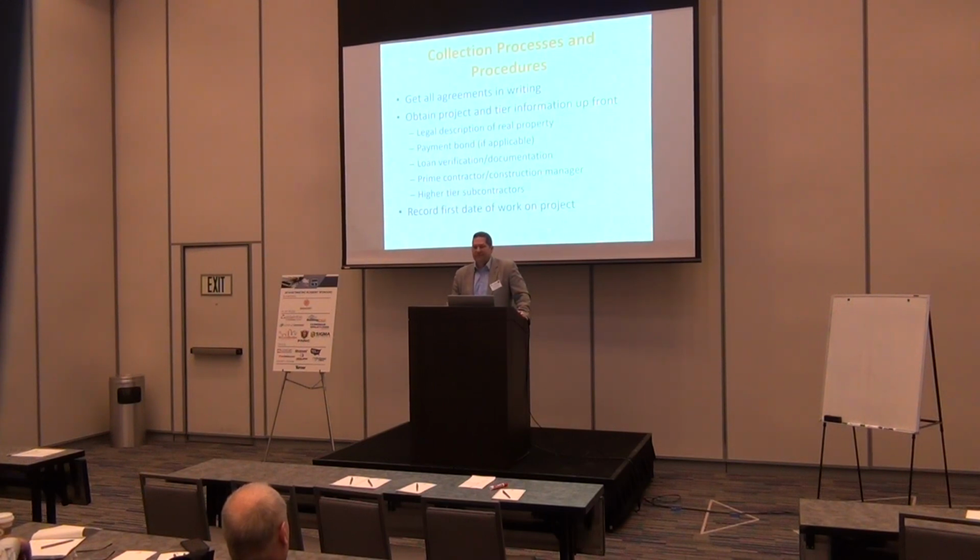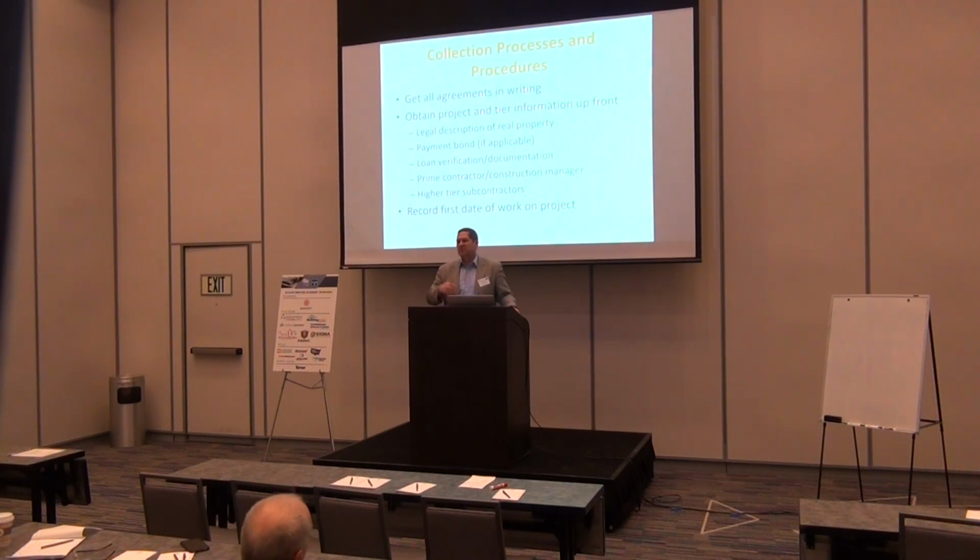I've had contractors call me up and say they want to terminate a sub, and I tell them it's a hard thing to do, even if you've got a really good basis for it. They may be slowing down the project, but most of the time they're going to look at that as a damages claim. I said, if you terminate them for convenience, then you're just done. And then sometimes they just say, I'd rather do that, because it's going to cost me a little bit more, but I'm going to get rid of that. So sometimes I choose that.